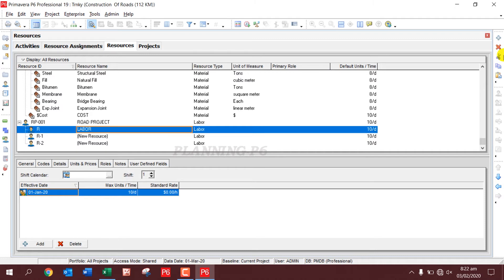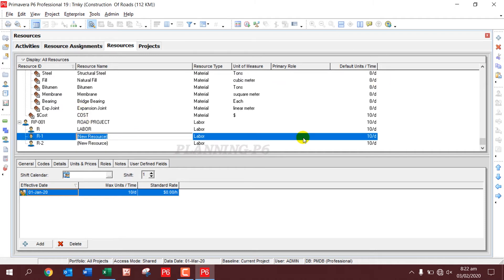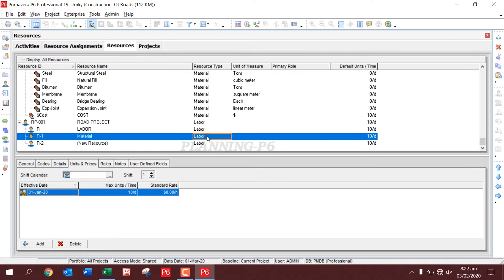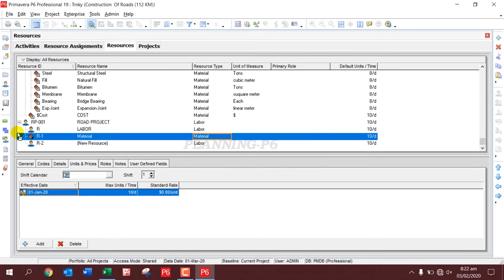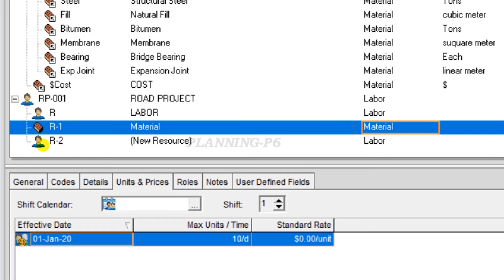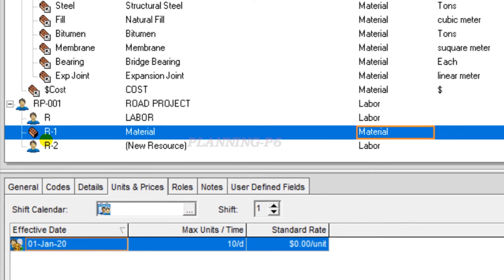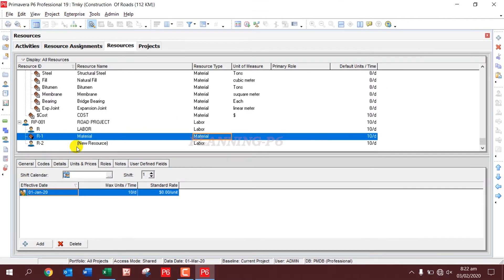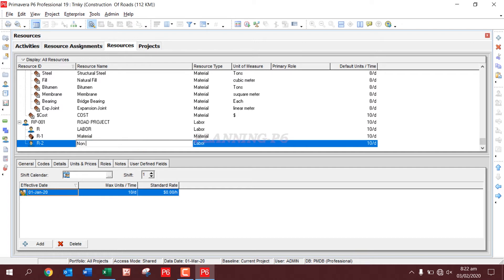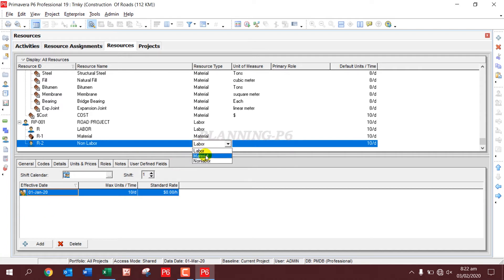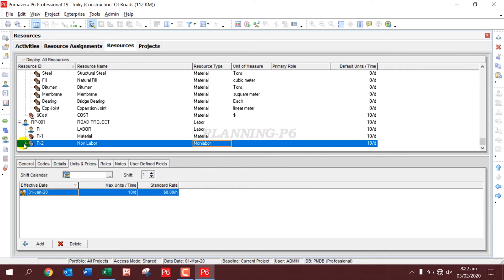For the next one, we'll mention Material, and we'll change the resource type here as Material. You can see here the brick sign. And R2 we will mention here as Non-Labor, and then we will change this resource to Non-Labor. You can see here that this is Non-Labor.